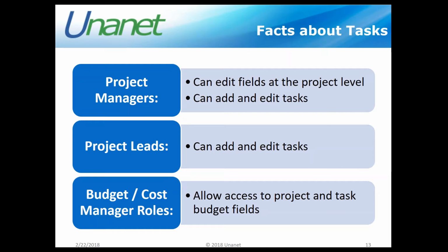Some organizations might not want their day-to-day project managers having that role of project manager within Unanet, and you can assign the role of project lead. Project leads can add and edit tasks. So we have the ability as a project lead to go in and set our budgets, some of the information on our task, our hours, and manage that effort from a task side. So keep that in mind if you're trying to determine where my project leads can help manage these efforts and not have the role as project manager.